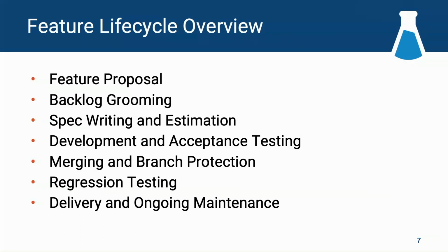For example, a high-priority bug fix might skip straight from feature proposal straight to development, because it might be straightforward and fairly urgent. Or things might go from development and loop back to need refinement in their proposals if based on discoveries made during development.